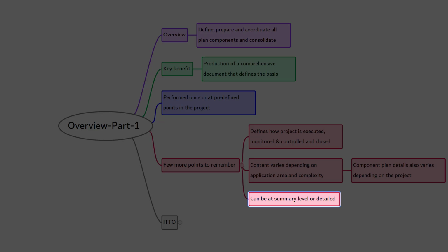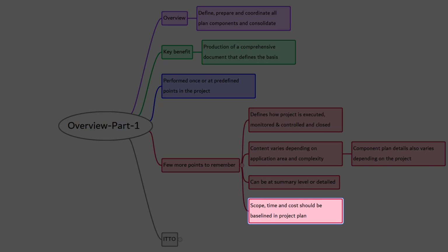The project management plan is progressively elaborated, so it should be robust enough to respond to the ever-changing project environment. The project management plan should be baselined, that is, it is necessary to define the project reference for scope, time, and cost, so that during project execution, the project performance can be measured and compared to those baseline performance. This is done to understand how well the project is progressing with respect to the plan.